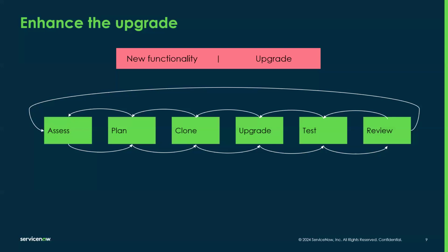Then the second thing is to think about your platform governance, a central board where you sit together and say, hey, this is the upgrade. Everybody already comes prepared to that meeting. What's new in Xanadu? What's the impact for you? And then make a decision there. And in that board, also think about who has a decision vote and who is at the table just to voice their concerns, right? Not everybody has to approve. I think you can say, hey, there are a few people centralized that approve, and the others can voice their concerns, if you really have a lot of stakeholders. It's not so much if it's 4 or 5 people making the decision, but I've seen platforms with a lot of people who needed to give their approval. Then maybe it makes sense to reduce it to a central ring of voting power and then just advisory councils around that.